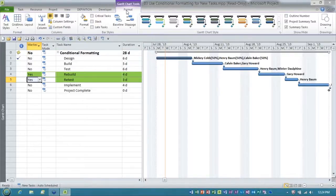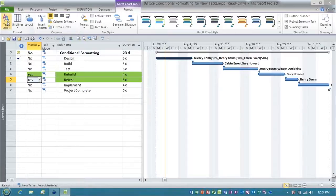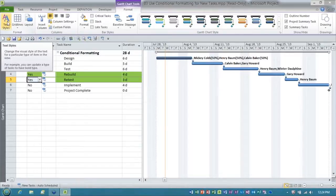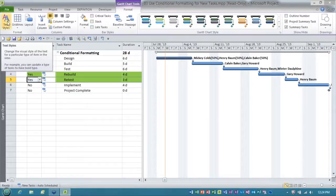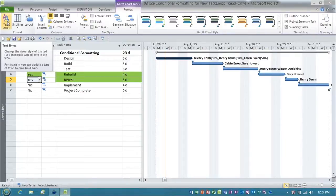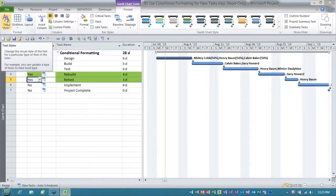What you would want to do is any templates that you're going to use to create projects from. When you create the template, you'd want to go to the format tab, text styles, and set your conditional formatting the way you want for things like summary tasks, milestones, mark tasks, and so forth. And then when you create every new project from those templates, it's all built in and ready to go. So that's a good question.